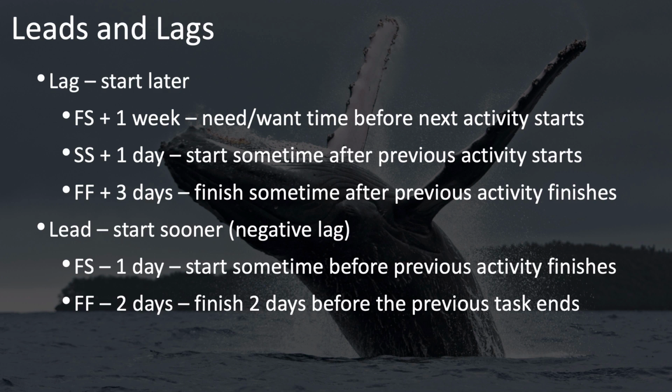relationship in which you want the plumbing done first, but if you overlap those just by a little bit, say 1 day, then you figure you're pretty safe in that the plumber will be wrapping up on one end of the house while the electrician can be starting on the other end of the house. They won't get in each other's way if they just overlap by 1 day. So that would be a finish to start -1. 1 day of lead time for the electrician to get started a day earlier than he otherwise would.